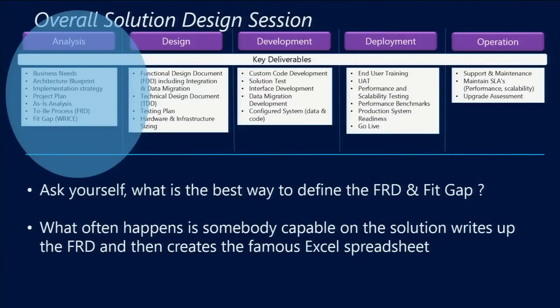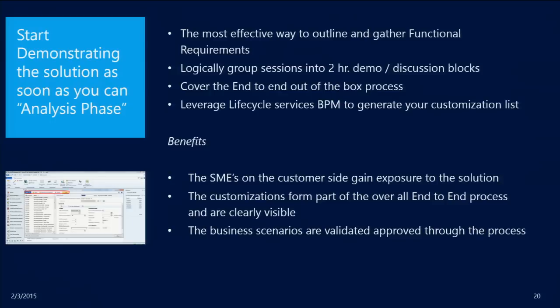Okay, ask yourself what is the best way to define the FRD and the fit gap? What often happens is, like we've mentioned, somebody with some knowledge just goes away in a room and writes it up and presents it back to the customer. And I'm reiterating again what we've just talked about in terms of the overall solution design. It's important to bring the product in the analysis phase. It's important to start talking the language and the terminology of the solution at that stage. It's important to start demonstrating the end-to-end processes and categorizing and grouping your functional requirements into those logical categories.